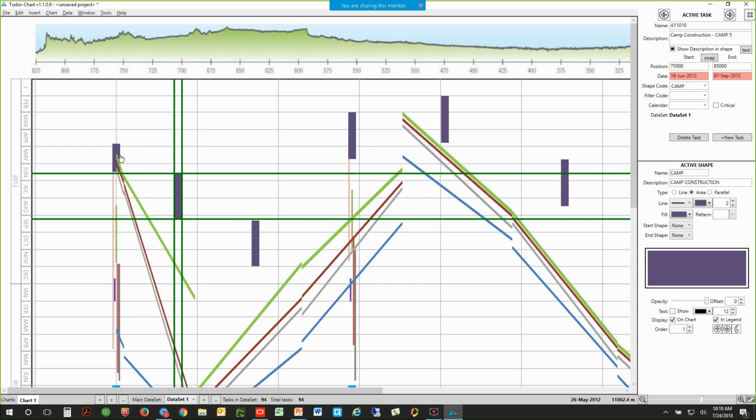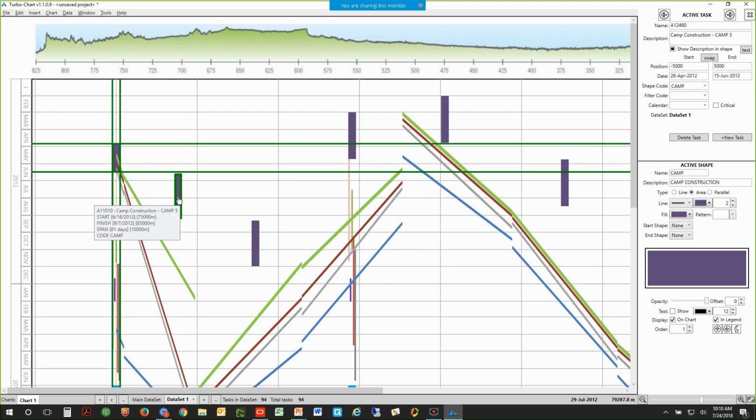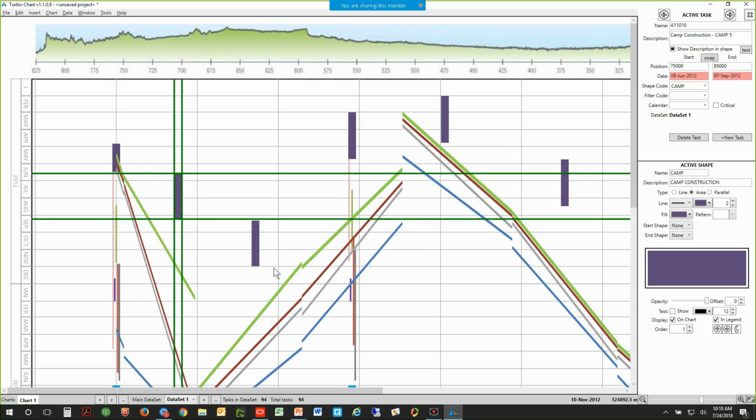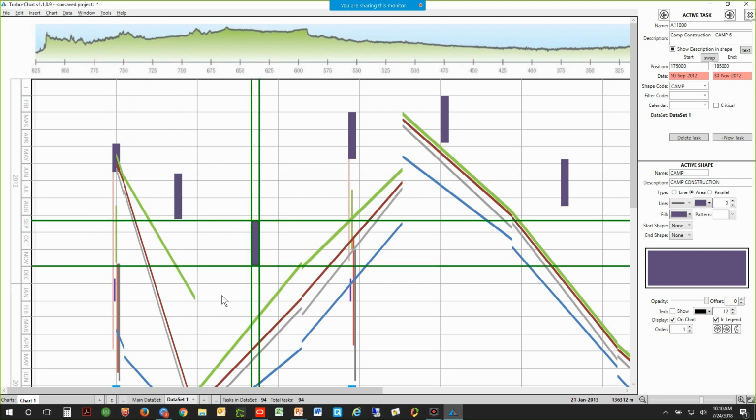Now what you see happens, of course, as you would expect, is camp 5 and camp 6, because those are the ones I logicked up, which are these 2, they've moved down. Now that's still looking like I could conceivably have these move down a little more as well. Okay, so I could still explore smoothing out those resources